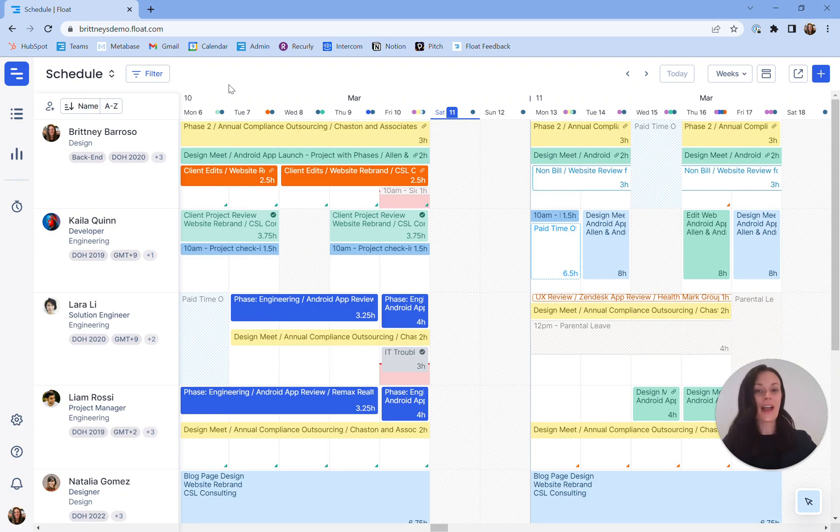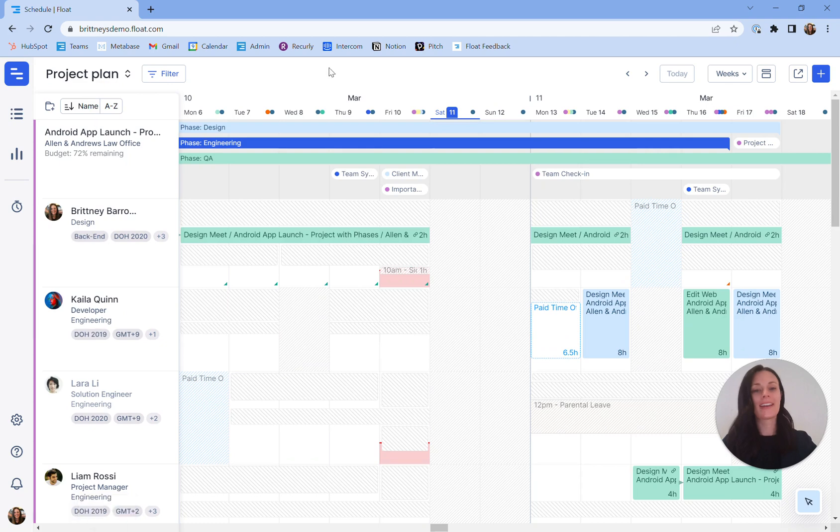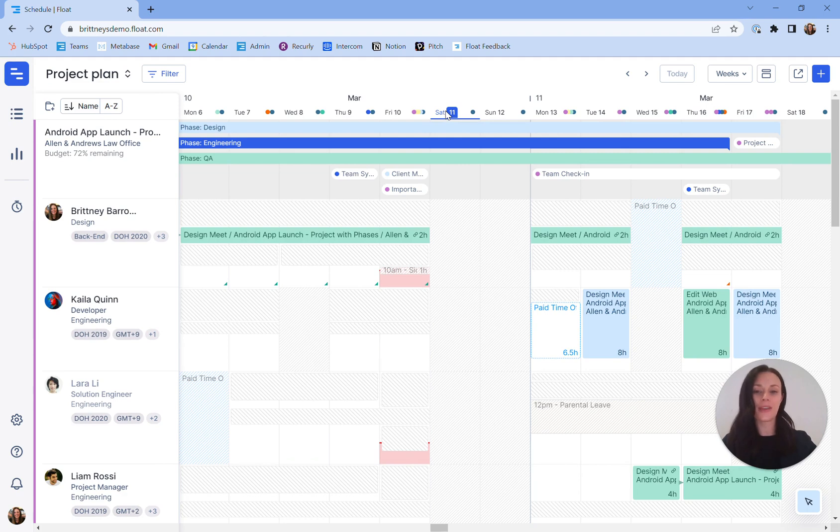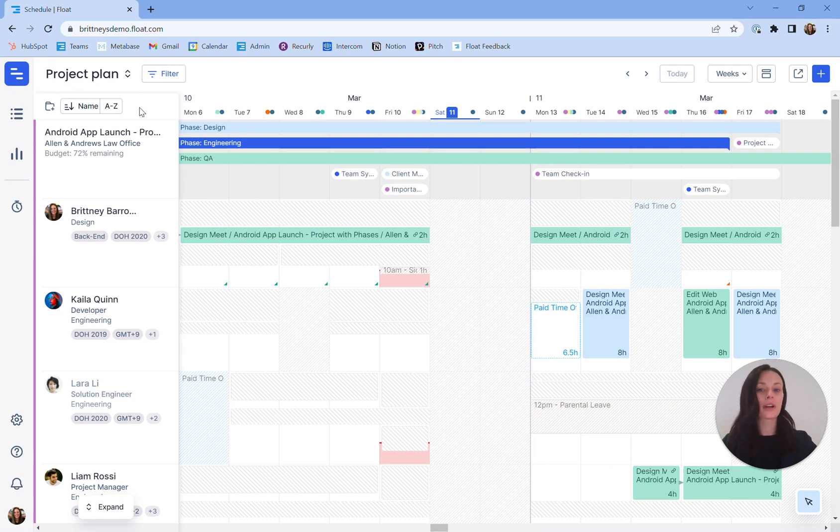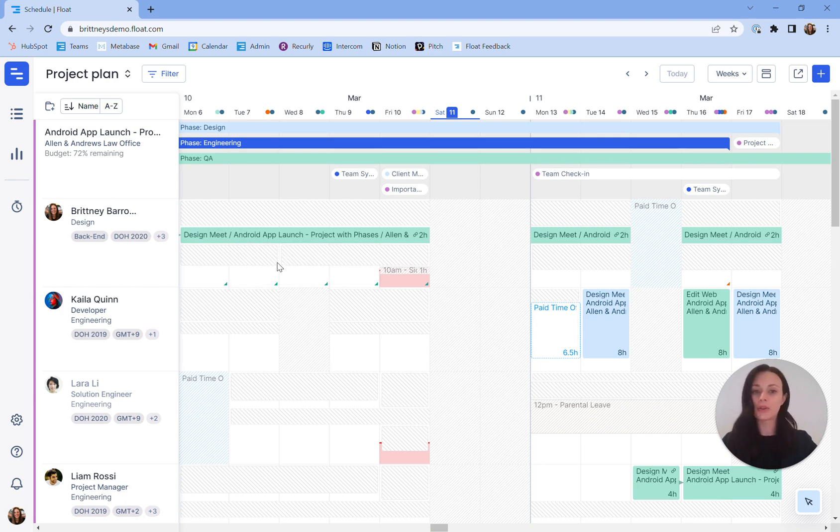Now that we have a better understanding of your schedule, let's jump into reading our project plan. Select project plan from the upper left hand menu and enable a Gantt chart style view of your team's projects. This view reorganizes your schedule information to make project planning and editing a breeze. Your projects appear with their current budget status while your team and their tasks appear directly below each project for visibility. Tasks will appear alongside the projects that they roll up to and tasks that aren't part of the project will appear as grayed out blocks allowing you to focus on the projects at hand while still giving you an overview of your team's competing priorities.